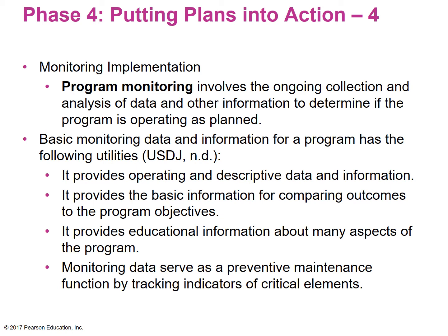It simply means that you can perform analyses continuously, monitor those results, and just keep an eye on whether they are trending in the appropriate directions. If they're not, now you have an opportunity to delve into this a little bit more. Okay, well, why aren't they? Do I need to do something differently, or what's going on? So that's the idea of program monitoring: it's like putting your fingers on the pulse of the program, and you're detecting for things going as planned, but more importantly, you're detecting things that aren't going as planned.